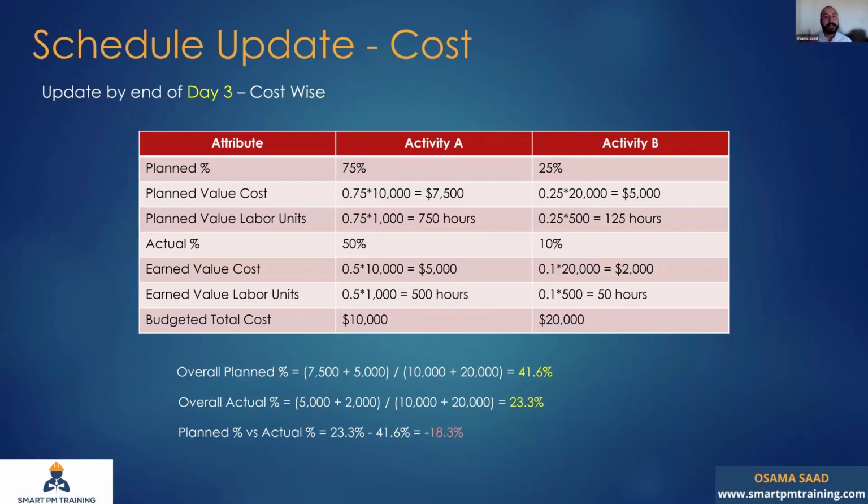Surprisingly, you can also be ahead of schedule. It could happen. Like I'm forecasting that I'm gonna finish the project 1 week earlier because of my performance against time sensitive activities. But I am showing delay based on the earned value metrics. I hope this is clear. Sometimes it's confusing, especially when you report the progress. Like you can have 2 days of delay, for example, but you have 20% delay earned value wise.